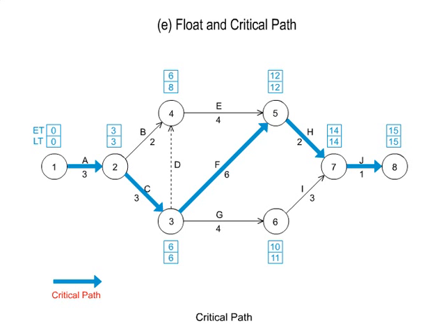To this point, we have reviewed the earliest node time and latest node time for each node. However, it is important to manage required time for each individual activity. The time units that must be addressed include the earliest starting time, latest starting time, earliest finish time, latest finish time, and float.